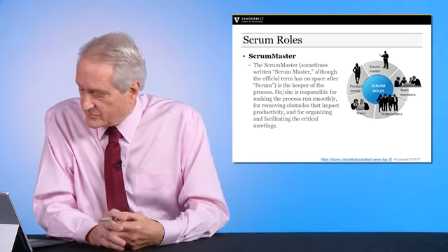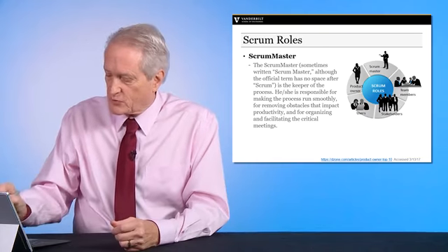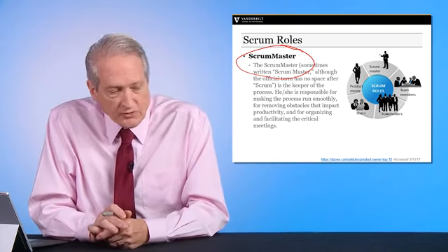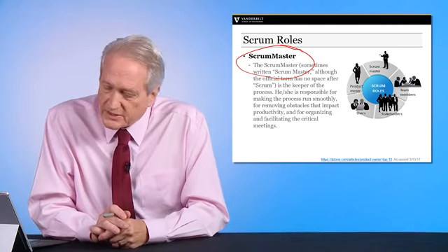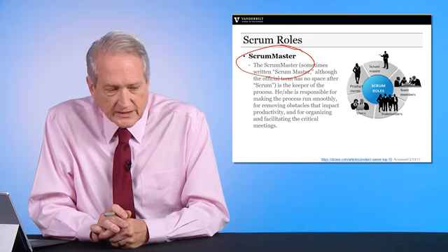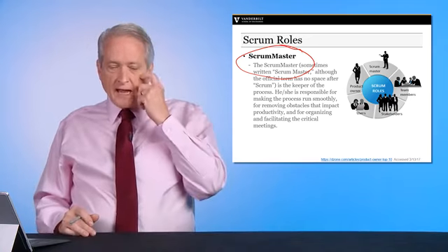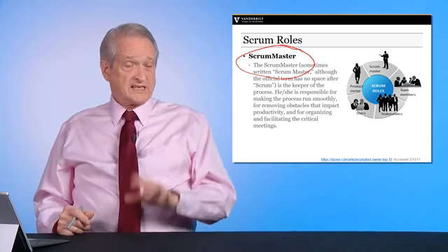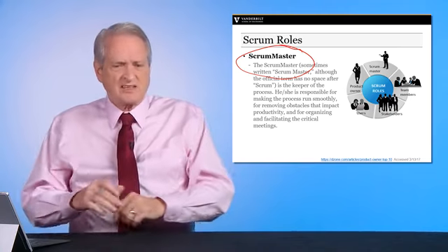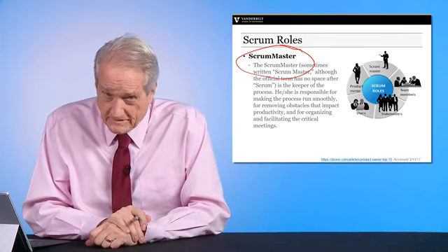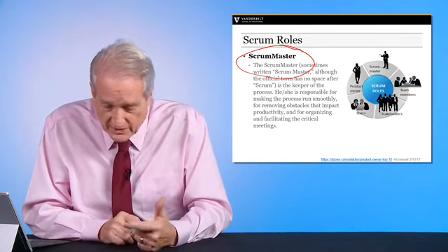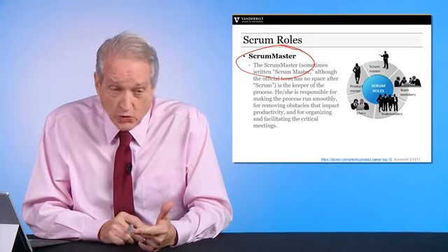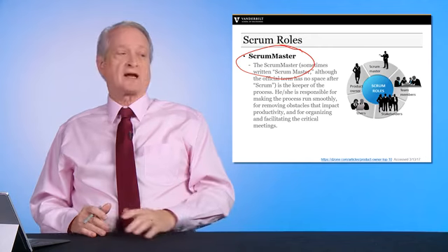The Scrum Master, you need to know what that is. Here's a Scrum Master. What is the role? Keeper of the process. I'm going to keep my team. We're going to have team meetings, and they will do team meetings standing up. And there'll be 5 to 15 minutes. Why standing up? Well, we're not serving food. We're not giving coffee out. We're doing it standing up, so it'll be shorter. Otherwise, meetings tend to drag on.